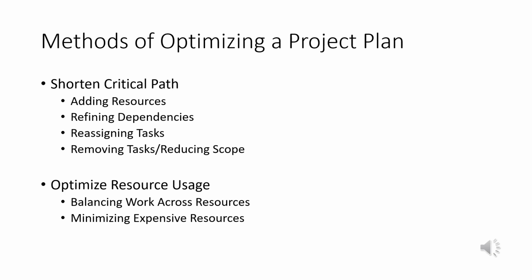And again, you want to optimize resource usage. If you got some resources, especially people or tools or whatever, and they're not being used, find some work for them. They could help, and see if they can help on the red line, the critical path, and see if you can balance work across resources and shorten that critical path up a bit.